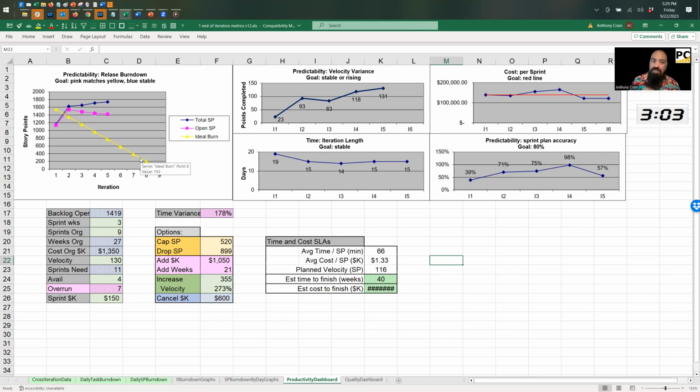Now, in my metrics, I always put a goal. That stresses people out. They're like, I don't know what the goal is. It's okay. First of all, never just use a point metric. If you tell me I created 10 stories, I'm like, I don't know what that means. But if you show me a trend of how many stories you've been able to implement over the last 3 sprints, 5 sprints, 10 sprints, now I can see trends. Trends are key. Everything's trend.